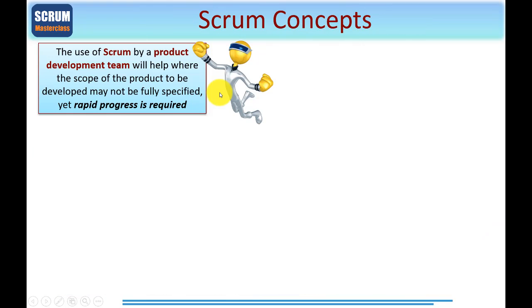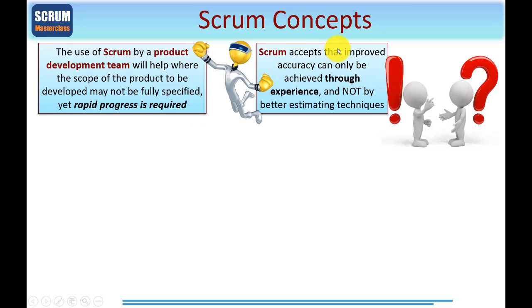Keeping a fairly high-level view, let's go over the basic Scrum concepts. The use of Scrum by a product development team will help where the scope of the product — meaning what's included and what isn't — may not be fully specified. Yet despite that, rapid progress is required. If the scope is not fully developed, then neither will be the requirements and user stories, which Scrum uses to represent requirements. It's quite normal and natural that the scope and requirements will evolve over the coming Sprints. Scrum accepts that improved accuracy can only be achieved through experience, and not by better estimating techniques. There's no magic bullet — you can only base estimating on experience.